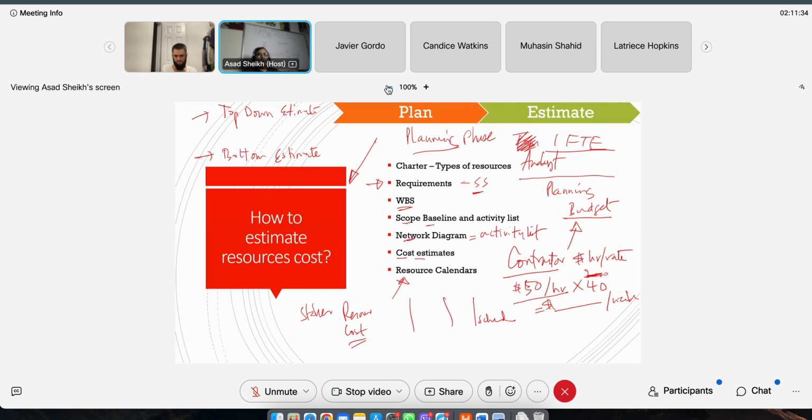And we'll go into more detail about task estimation in this schedule planning chapter. But at this time, all you want to know is, how long do you want to keep this guy? 1 month, 2 months, 3 months. We need to know what this person is going to do, how long each of the activities is going to take, and let's add it up, multiply by his hourly rate, and get an idea to estimate the cost of this resource.